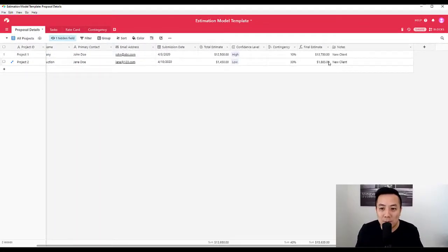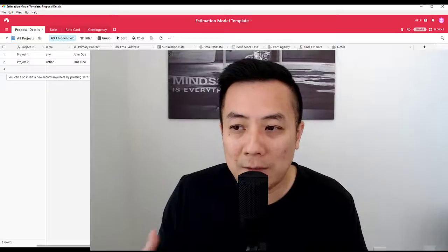So that's how you roll up your entire estimate, and you're baking in a contingency, which is basically helping you cover any additional costs or unexpected things. And what that will allow you to do is have a friendly conversation with a client and basically say, hey, you know what? We didn't estimate for that, or we didn't account for that, but no problem. I'm going to absorb it. Because you know internally you can take on that work because you have this contingency, if it doesn't eat up your contingency. But the client doesn't know that you have the contingency. So don't share the contingency with the client.